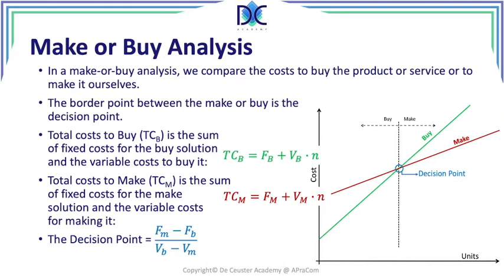Basically, what PMI says is, if we have to choose between make or buy and all parameters are equal, we would prefer to buy it because the product is already working, it's compliant with what we do, and if we have to make it ourselves, it may be introducing more risks because we have to find out how it works. It's sometimes better to take something off the shelf.